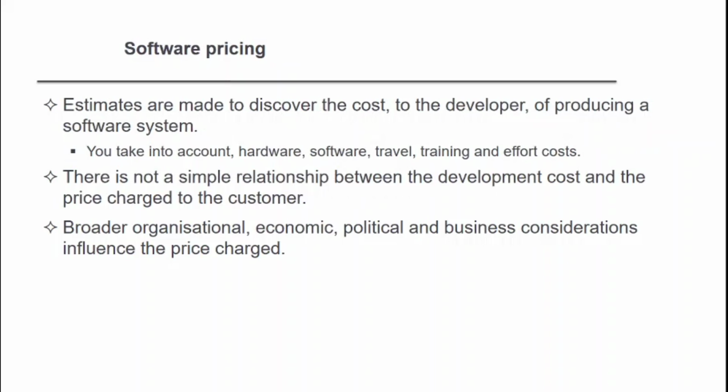As well as that, there are parameters required when computing the cost of a software development project. That is effort cost, hardware and software cost, including maintenance, and travel and training cost. Sometimes when you start developing a project, you have to travel here and there to gain knowledge. At that time, some training is also required. So the company will provide training for you, and the training cost as well as the travelling cost has to be calculated while bidding for a project.